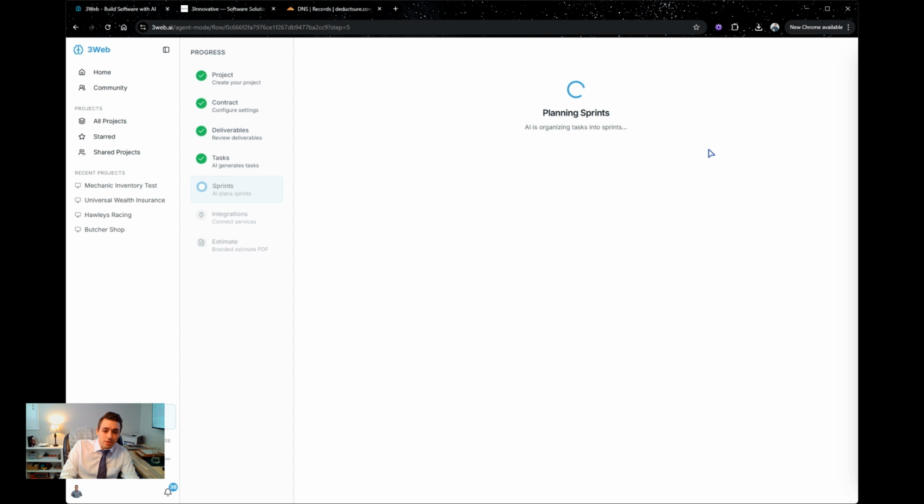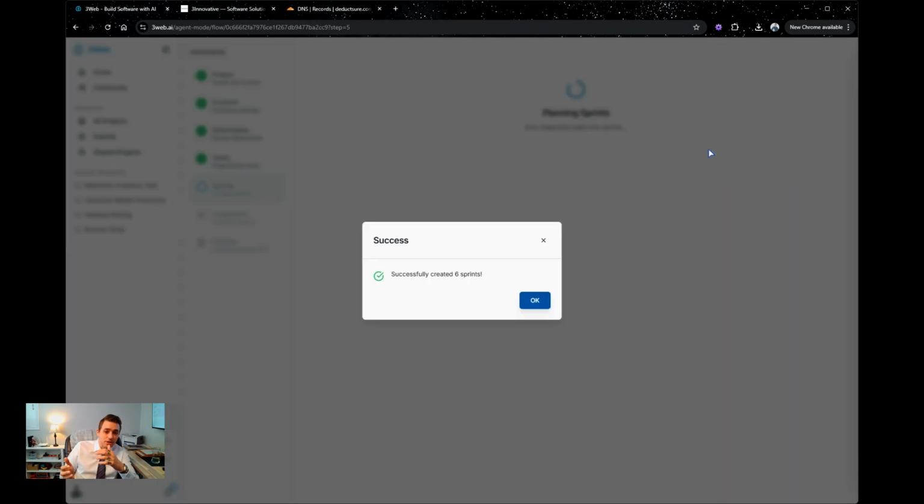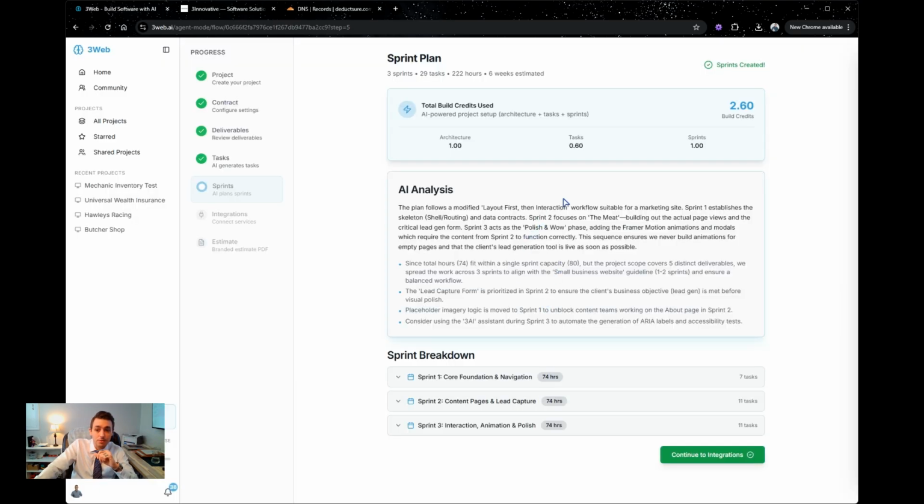So a great way to do this if you're new and starting out is to bill your client based on each sprint completion, right? The old way, when I started doing this 15 years ago, was half down, half on completion. Then it kind of shifted into milestone-based billing. So then it's more like, okay, I finished X amount of tasks or this deliverable, and then I want to unlock that next stage of money from you.